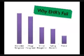Also, change management. If you haven't done the planning for or introduced change in a positive manner, then change management issues will come to the top. Also, vendor management. If you don't have one specific person that's responsible for that relationship with the vendor, and it is not managed properly, then you will have issues in regards to the vendor.